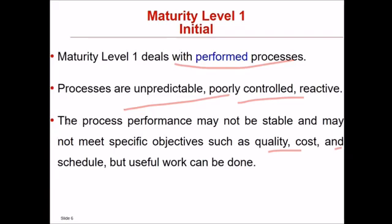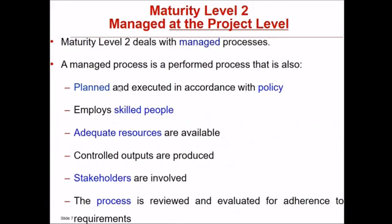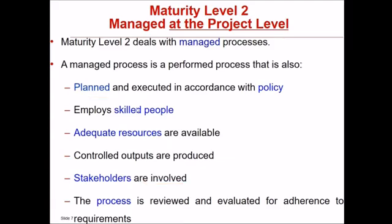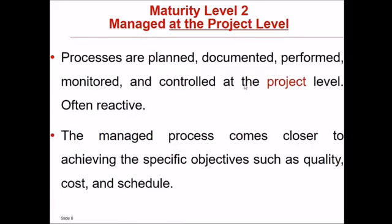At level one, useful work can be done but not in the manner sought. Maturity level two is Managed. A managed process is a performed process that is planned, employs skilled people, has adequate resources, produces controlled outputs, involves stakeholders, and is reviewed for adherence to requirements. Processes are planned, documented, performed, monitored, and controlled at the project level — often reactive. The managed process comes closer to achieving specific objectives such as quality, cost, and schedule.